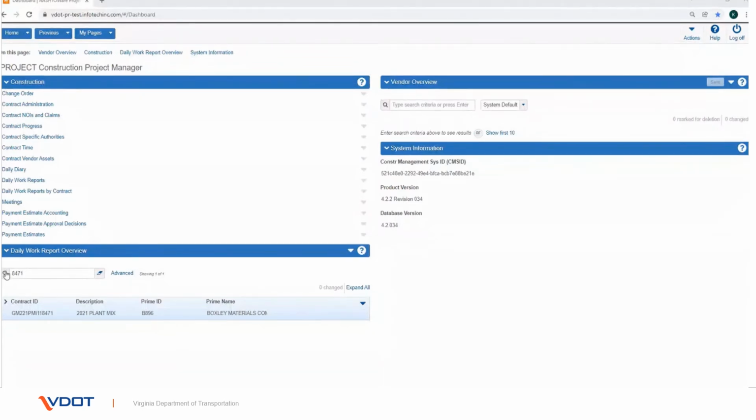In this video we will demonstrate how the payment estimate can be submitted for approval. The Submit for Approval command is available only for payment estimates with a status of draft or rejected, and only if your active user role is assigned Approval Level 1. The first approval level in the series, for the payment estimate.